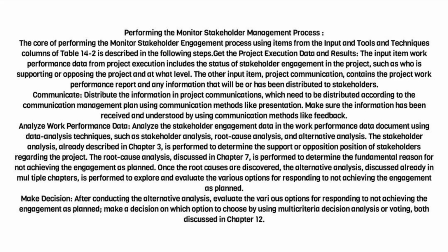Make decision. After conducting the alternative analysis, evaluate the various options for responding to not achieving the engagement as planned. Make a decision on which option to choose by using multi-criteria decision analysis or voting, both discussed in Chapter 12.